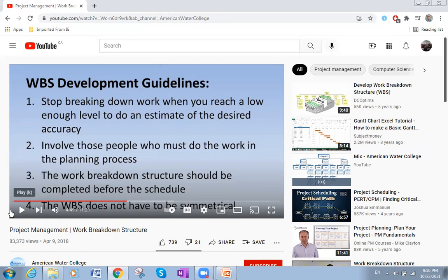As an example, take cleaning and dusting. When it goes down to the final subdivision of the task, it doesn't mean that all the stages must be the same. Vacuuming is different from cleaning the curtains, and cleaning the curtains is different from cleaning the carpets. Each task can be divided into subtasks, for example, cleaning the carpets. How many levels or subdivisions should cleaning the carpet take? Only one level, cleaning with vacuuming, that's it. But for vacuuming, to get the vacuum, you have to plug it in, take it and put its components together, and then after that start vacuuming. Those are 3 steps.